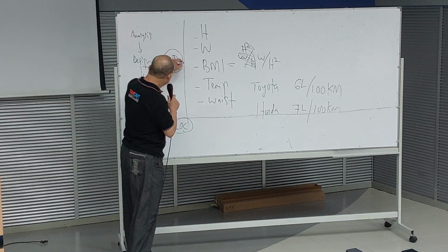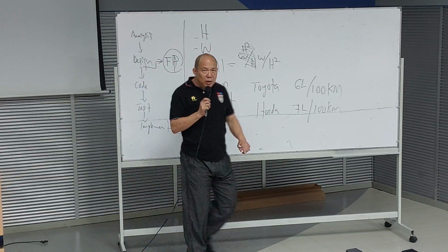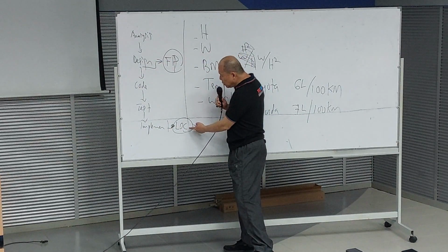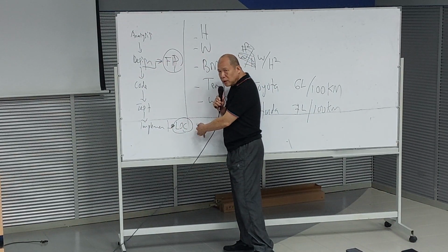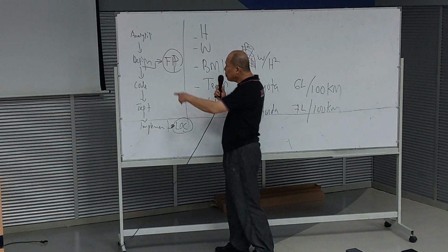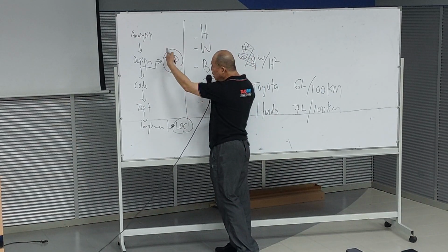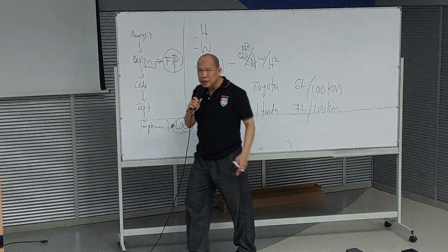you can only determine the lines of code when the project is completed. Okay, but function point you can determine at the early stage of the project.